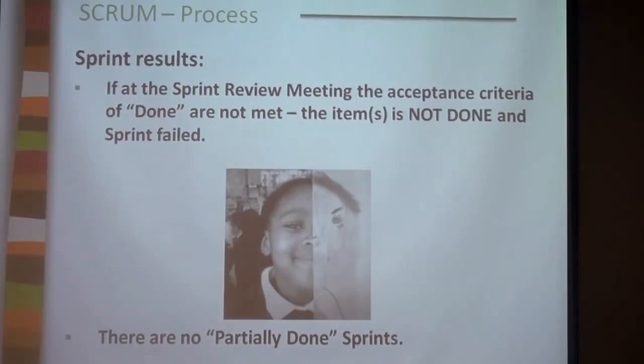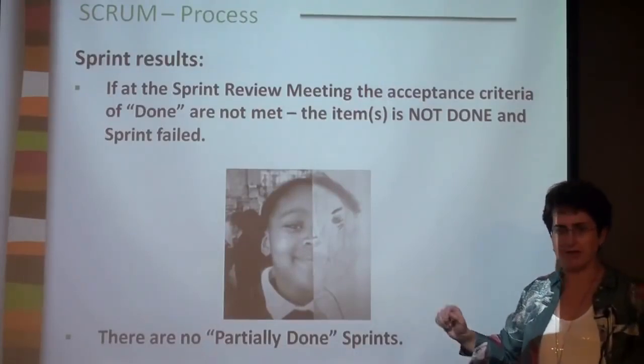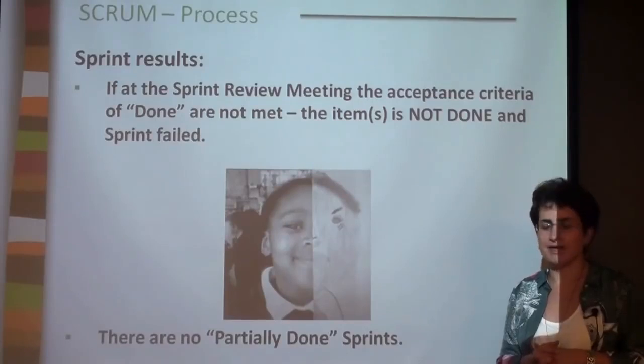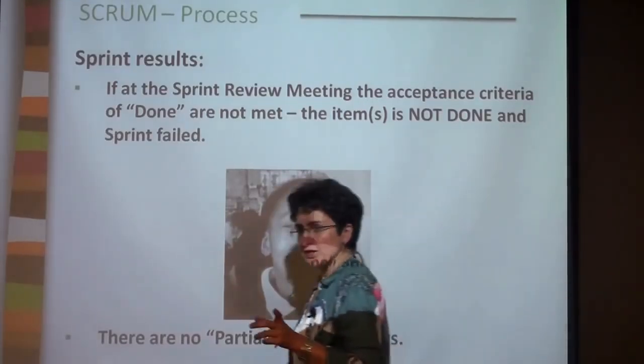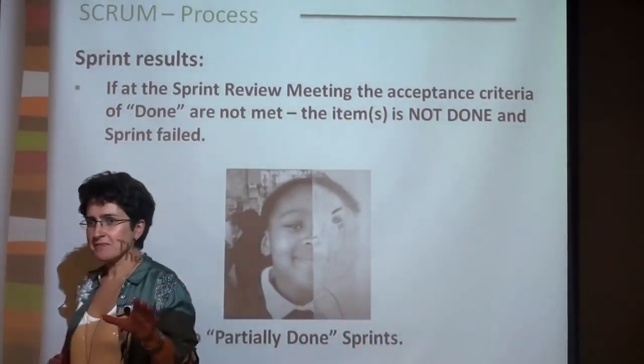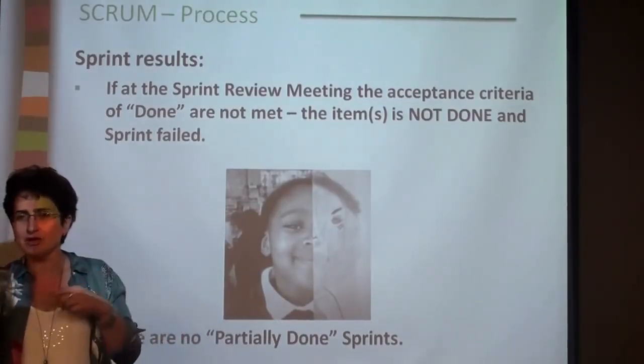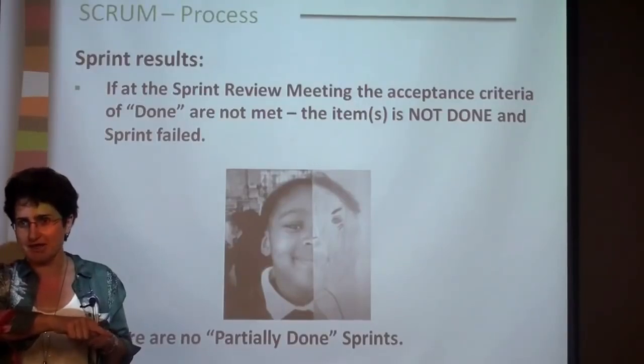And revised sprint then? Okay, so if your sprint succeeded, we are happy, right? If your sprint failed, good question. Can you do a revised sprint? Not really. Your sprint failed. A sprint is an instance of your development. It's gone. You cannot enter the same sprint again.